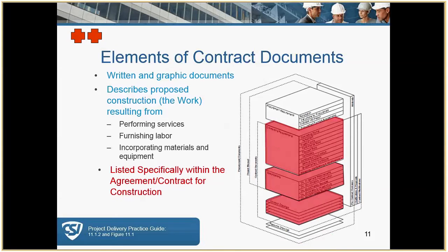This being the colored section of it, consisting of the contract forms and the agreements. Sometimes the bid forms, if they're referenced in an agreement, sometimes you'll have a lengthy unit price or alternate requirements, and rather than having to retype them and put them in the agreement, often they'll just simply refer to them.